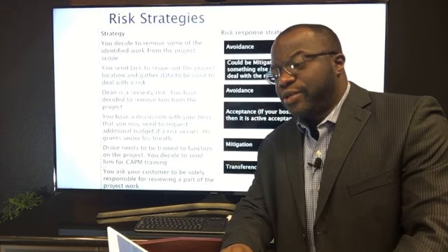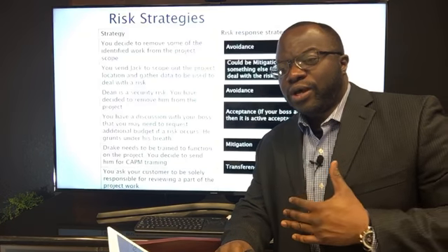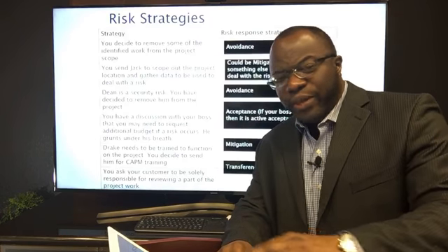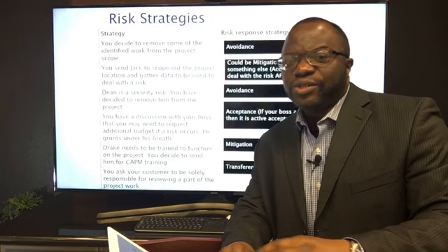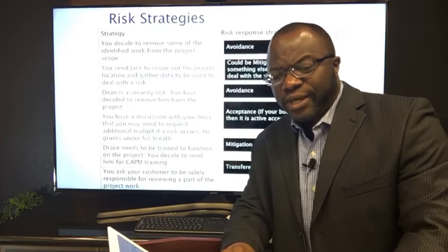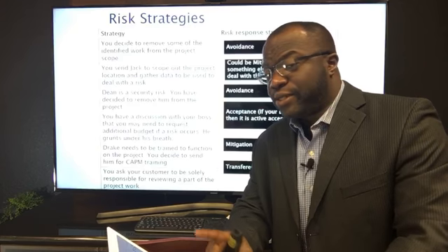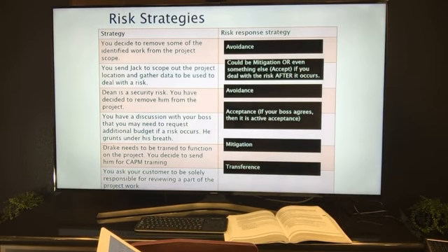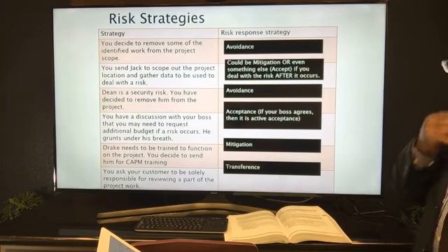That is transfer. So you said, we're not going to do the work, we're going to give it to a third party to do. The work has not been cut off from the project, it's still there, so it's not avoid. The scope to do the scaffolding is still there, but you've only transferred it. This stuff is very subtle. My advice would be to read it up in some more detail. All right? Let me give you one more.